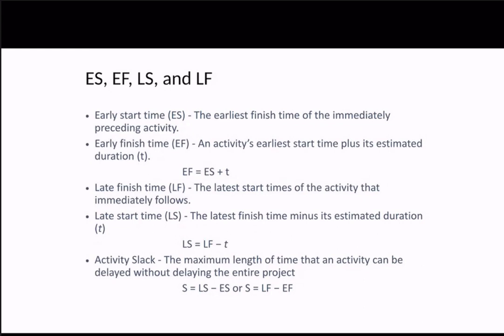The thing is, we need to start with the ES, because this is the earliest start time and earliest finish time. So we start with the ES, and when we calculate these two, we go from the start to the finish.